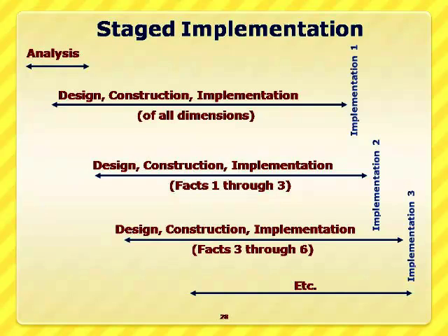This implementation I define as implementation 1. Next I take up design, construction and implementation for the next set of facts, let us say facts 3 to 6. That is implementation 2. Like this I go on taking a few sets of facts and implementing the data warehouse. The advantage is that in each stage of implementation I will be learning from mistakes.